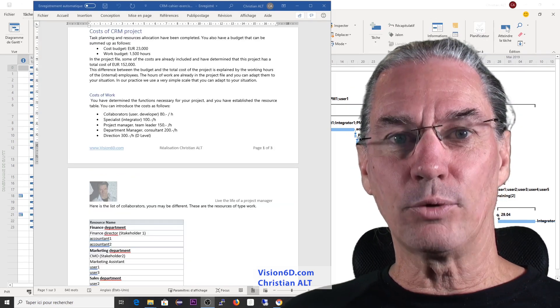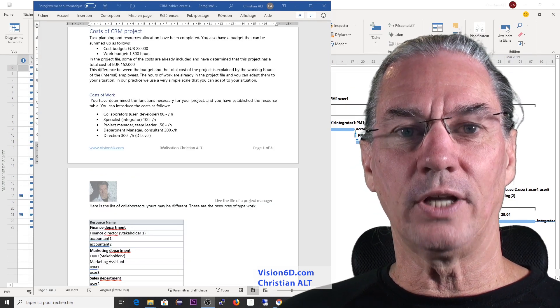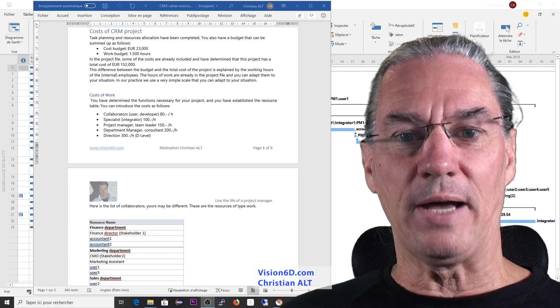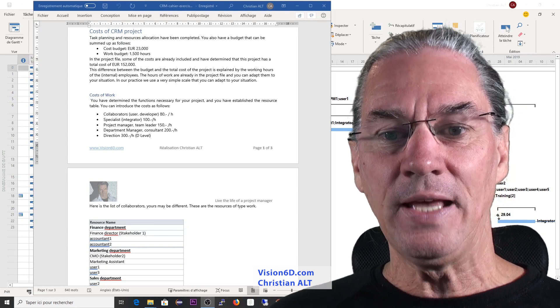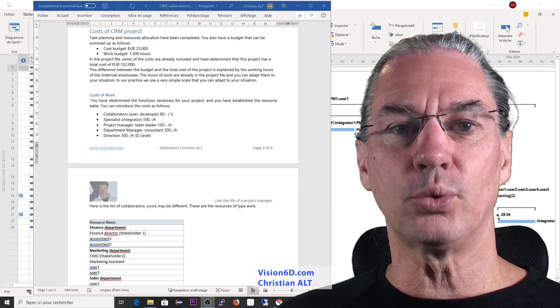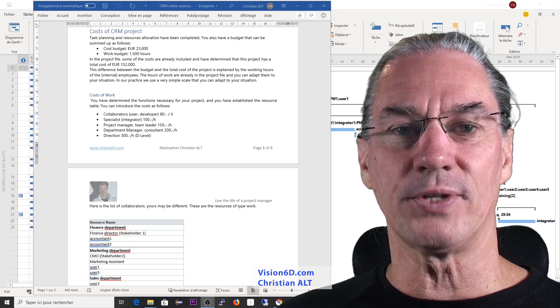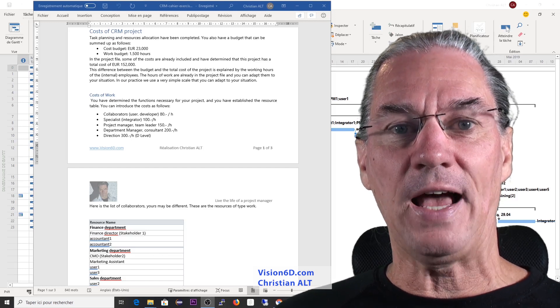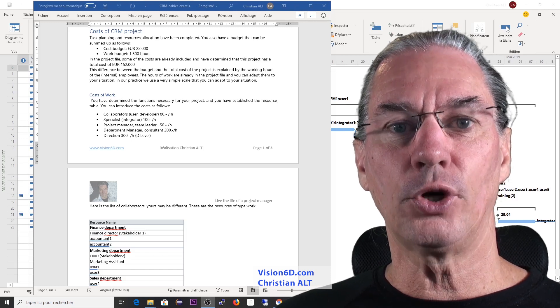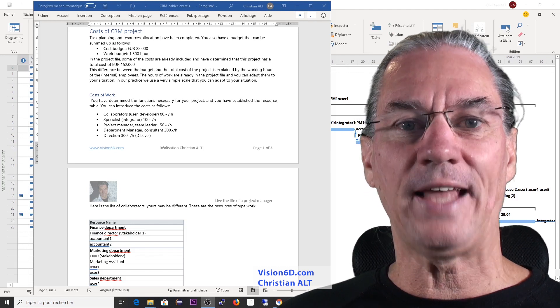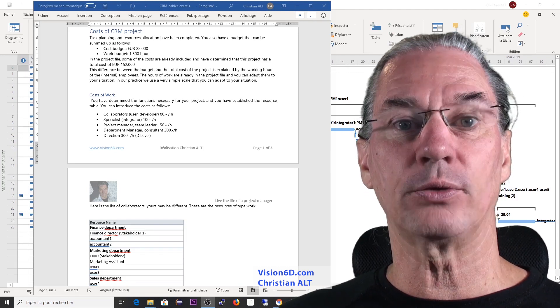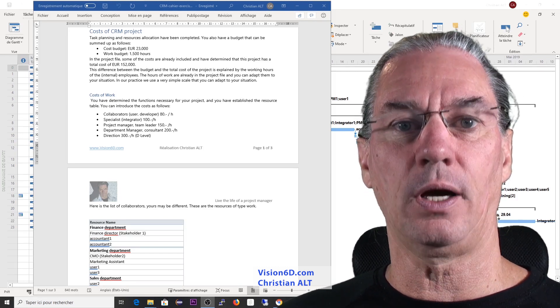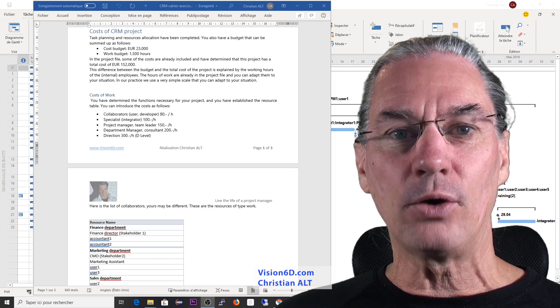In our project, we've now calculated the budget. This has been done and we have a budget with a cost budget of 23,000 euros. And we have, as well, for the co-workers, in all, 1,500 hours that will be spent on the project.